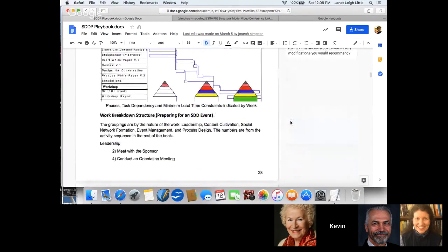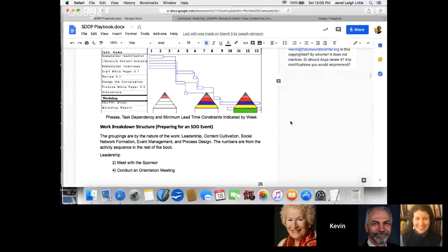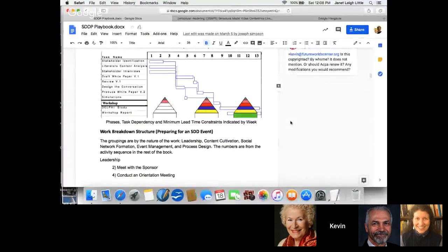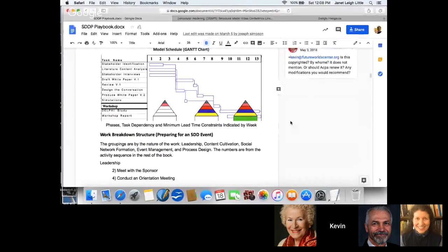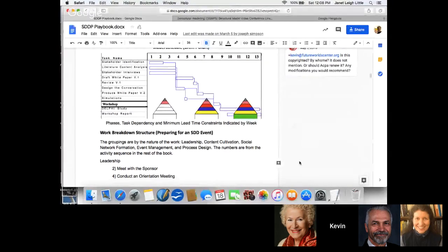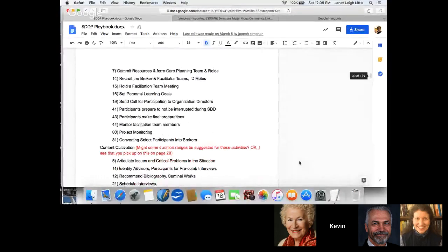And there's just a model project management timeline, and it was designed to be able to be done in 3 months. The prep requiring at least 10 weeks ahead of time. And that was given for an organization that we had already worked with, for which they could summon the expertise in the domain. So this is very aggressive. I've been involved in projects that had a year-long lead time.